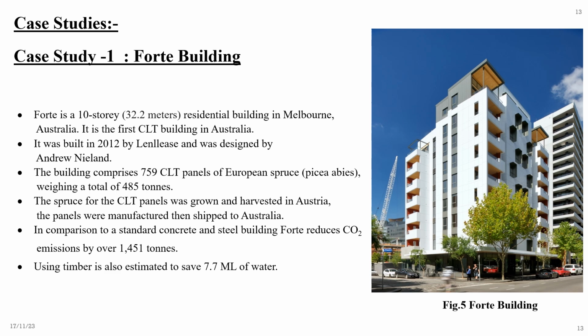It was built in 2012 by Lendlease and was designed by Andrew Neeland. The building comprises 759 CLT panels of European spruce, weighing a total of 485 tons. The spruce for the CLT panels was grown and harvested in Austria. The panels were manufactured and then shipped to Australia.